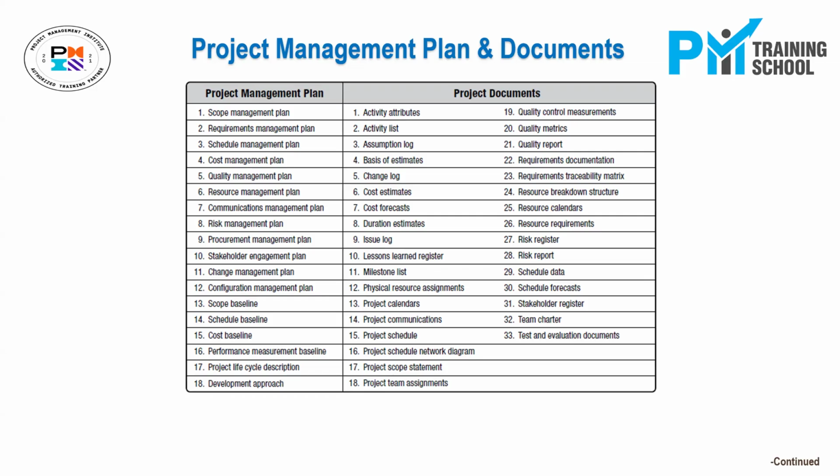Naturally, the instructions or guidelines provided for the scope management plan might be amended. So you can update the scope management plan, or the procurement management plan, or the scope baseline, schedule baseline, cost baseline, or even your life cycle and development approach. Those things could be amended or changed as a result of the change request. It just has to be recorded in our favorite configuration management plan.